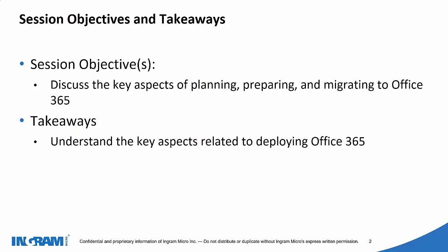The first phase is planning. In the planning, you do a kickoff meeting with your customer, in which you will gather the complete business requirements they have for their Office 365 or Exchange Online, and the technical discovery of their existing infrastructure. It means you will have the complete details of their existing infrastructure, their Exchange, their SharePoint, or their Skype for Business